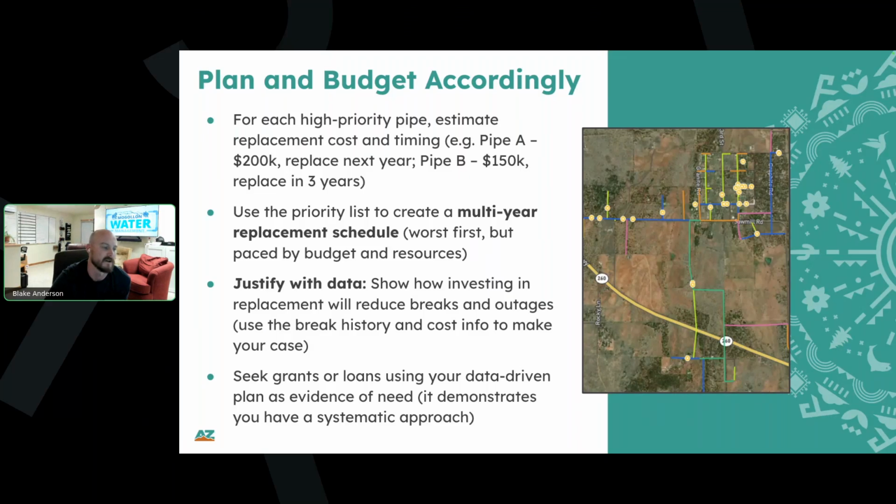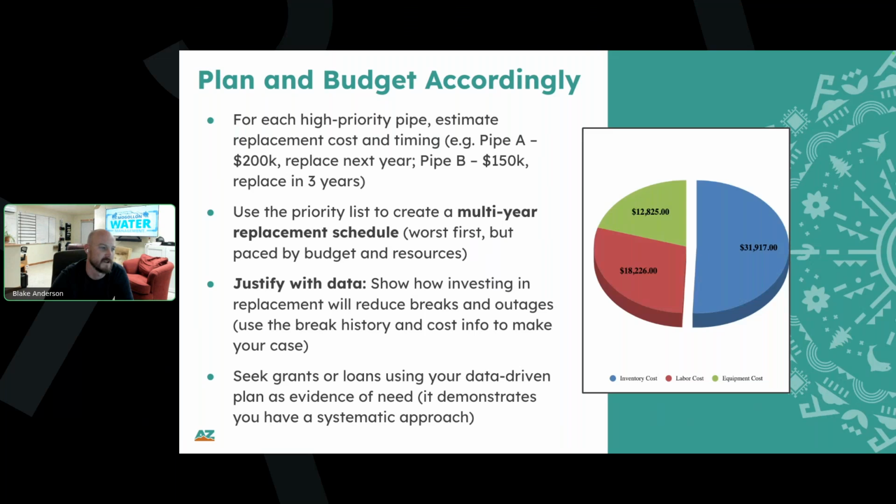But we were able to take the leak repair information from this specific system and put it all together and show it in a way to the board that we were able to say, hey, in the past couple of years, they were spending like 20%, genuinely 20% of their revenue on repairs. And over half of that was going to these service lines that they just kept splicing in and patching. And we explained to them, hey, the cost of digging up this short side service or long side service and splicing in this little section of pipe like you have done in the past is a few $100s. For not that much more, you could just dig up the whole thing and replace it.